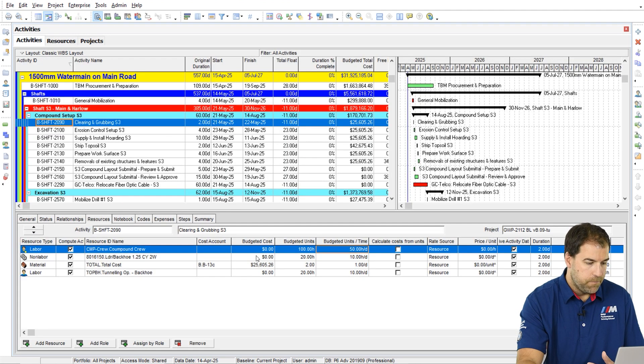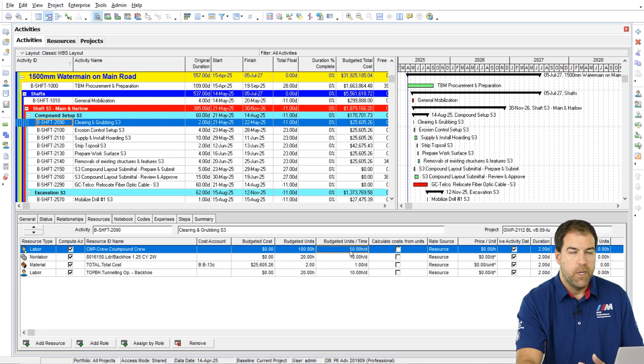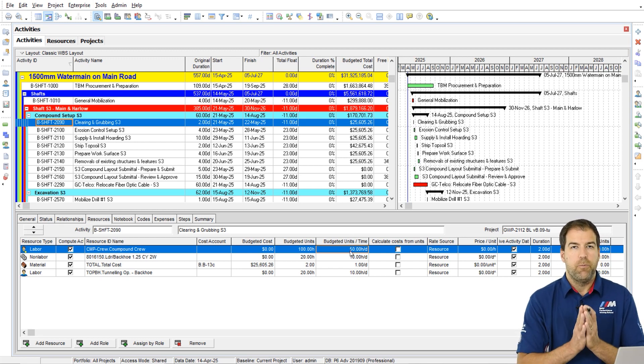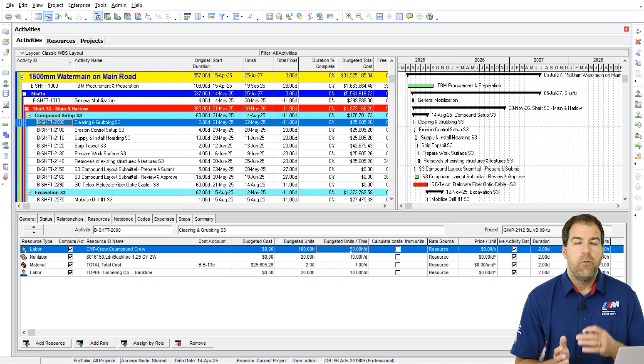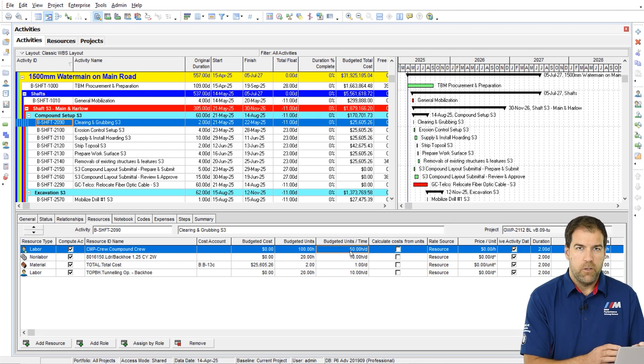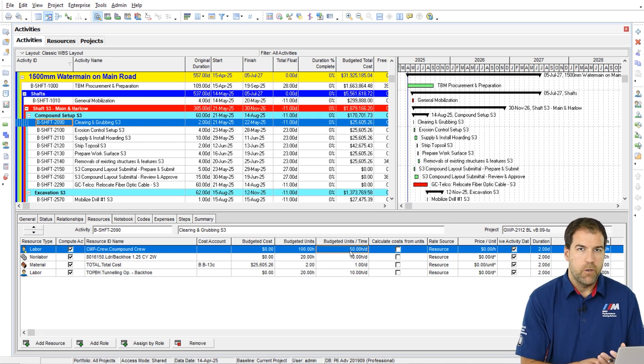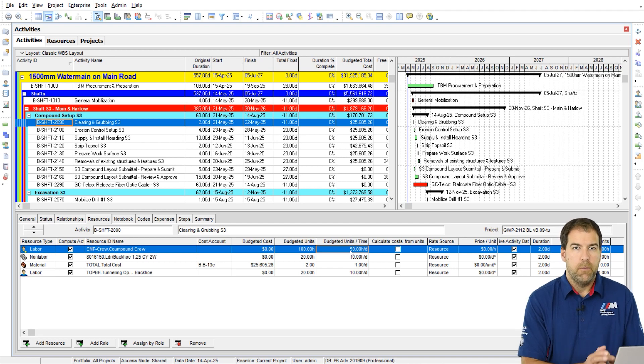And back to the activity, I can see that I have assigned the crew at 50 hours per day. Again in P6 that means your productive capability. Basically, this resource, this crew can accomplish 50 hours of work in a day. That's what that means.